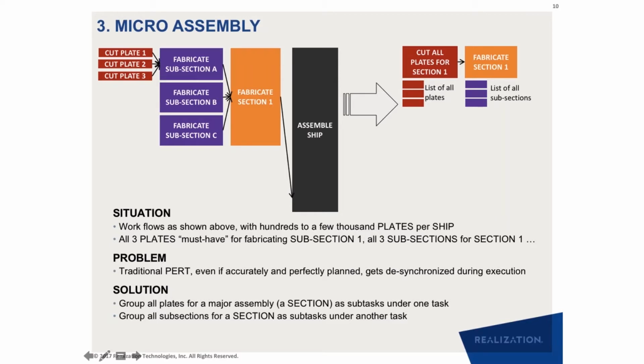So you really don't need to know a lot of the details of tier 2. And in fact, that is the trap that you want to avoid getting into. The moment you get into thinking about tier 2, then you get paralyzed, because a lot of times those details cannot be known, or those details will keep changing. Or if you ask 3 different people, they'll give you 3 different answers about those details. So you really don't want to get down to tier 2. You really want to stay at tier 1 level if possible. Michael, you want to add something to that?